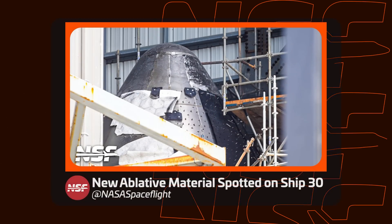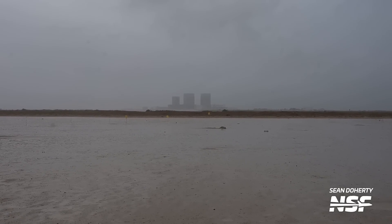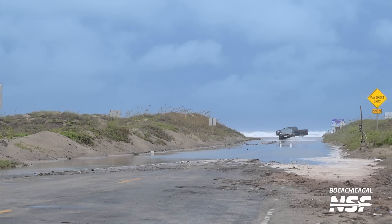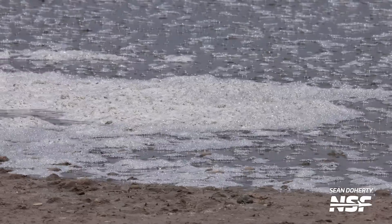If you watched any of our un-narrated Starbase videos this week, you may be wondering why there was not that much footage from the 19th and 20th of June. Well, this comes down to the fact that a tropical storm hit Boca Chica in that time frame. Part of Highway 4 was actually closed thanks to a judge order because of a high risk of flooding, and Boca saw over 25 centimetres of rain per square metre in a very short period of time. Part of Highway 4 actually ended up significantly flooded with mud dragged inland. At the time of recording, Sean, one of our photographers out there, reported that Highway 4 is still flooded just before the production site. Because of this, SpaceX slowed down the work at Starbase, as it was becoming less safe to drive down the highway and unsafe to work at height on aerial work platforms during high winds.